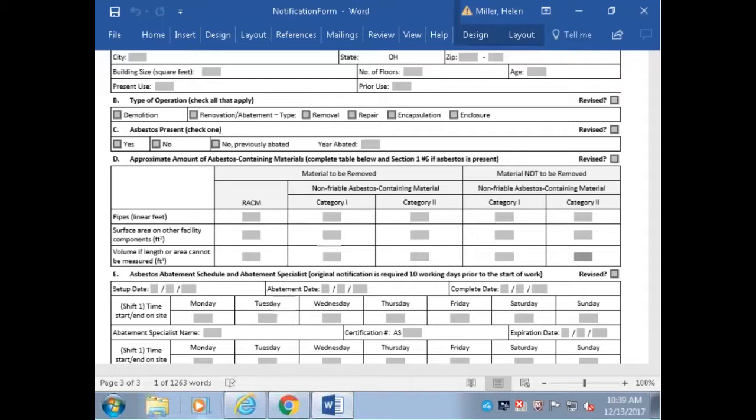One of the questions, if you do everything online, does it still take 10 days to kick in, or does it go to 3 days? No, it's by rule, it is a 10 business day.